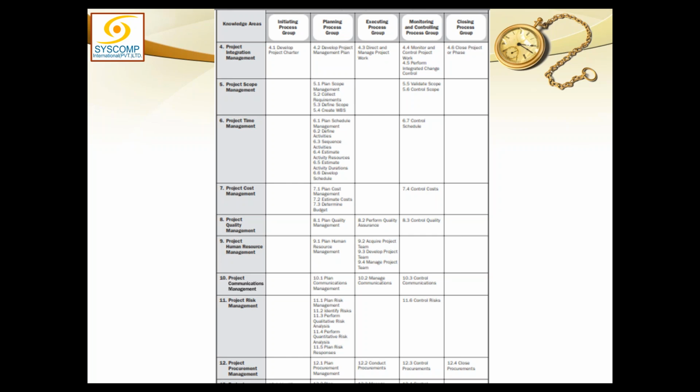As far as the procurement is concerned, when we are initiating the project, we do not know that it will be further outsourced because we have not yet planned by ourselves. Once we have gone through the planning process, we would know which of the jobs we can do ourselves and which is the job which has to be outsourced. Therefore, we plan for procurements in planning. Initiation has nothing to do with it.